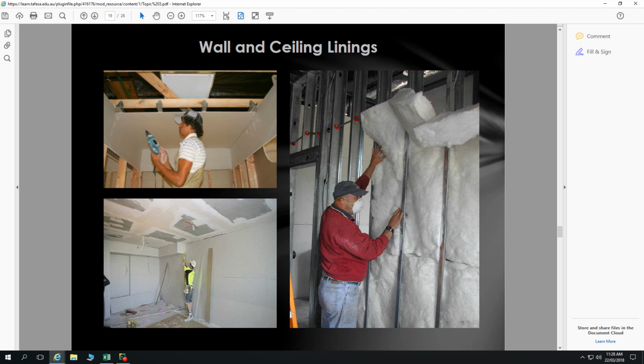And also, before we do any of our linings, we're going to want to have our doors in place as well. The house is going to be at a stage which is called lock-up. The reason we want our house all closed up before we get our linings on is that, particularly if it's winter and there's a lot of airborne moisture, if we've got our doors and windows open when we put our linings in, they'll soak up too much moisture and they won't be able to do the flushing properly, and we'll get warpage, etc. of our internal linings. So we need to protect our internal linings from the weather, particularly from wet weather.